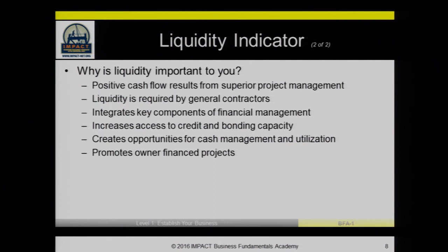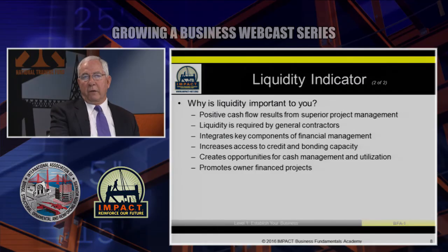It also, if we have high liquidity and a solid balance sheet, increases the credit and bonding capacity of the firm. It creates opportunities for cash management and utilization and promotes owner financing of projects. So one of the questions we always ask contractors is, who's financing your projects? And the answer ought to be, we're financing those with our work in process and through our billing process, and the owner of the project is actually financing the project.